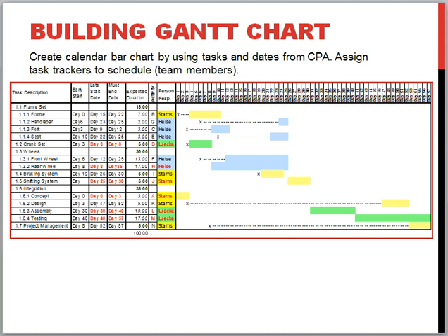You'll notice here that what we've done is the colors match up with the persons. Also, we've taken any critical path items and indicated those with bold red type for the dates and the persons tracking. We've shown float times as X with dashed lines, so we can see how far we have available to slide these tasks forward if we wish to float them earlier in the project timeline.